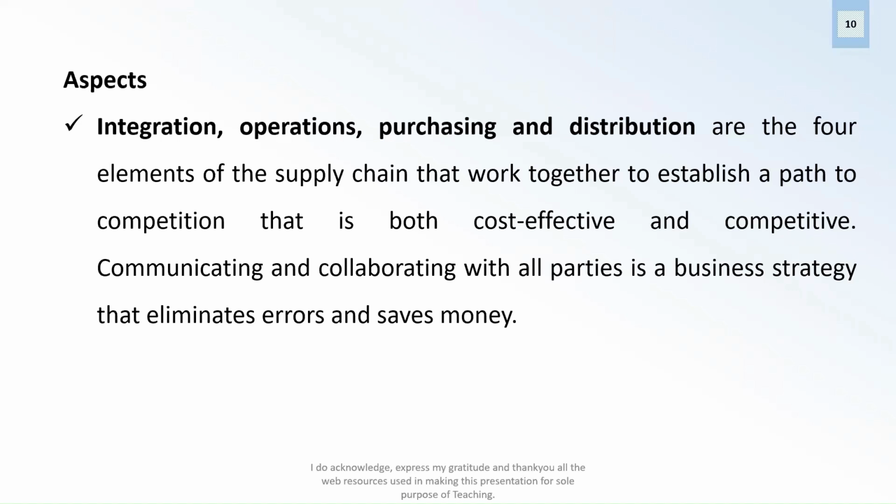So for each activity of a process, as we discussed during project management, the concept remains the same. When you make a work breakdown structure, it includes all the activities to be done in different steps. In that, the smallest unit is the work package, that means the package you can independently do. But that work package is also further distributed into activities. Each activity is independent and needs to be done in parallel with another activity, or done before the next activity in sequence.